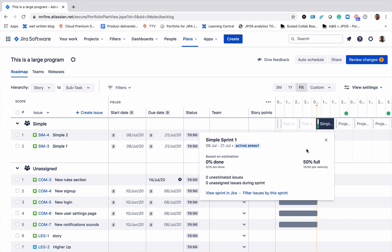If we click on it we get more additional information such as the team's capacity, the velocity, and how many points are allocated to that sprint.